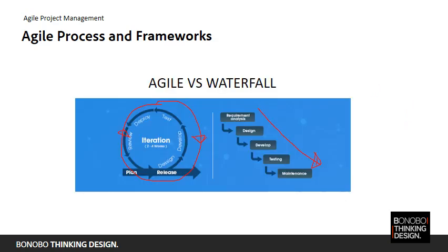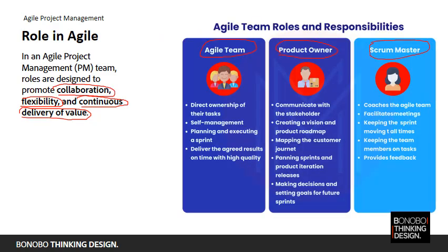And lean is about maximizing the value by minimizing waste, and that's again part of the continuous improvement. And then just-in-time production, again part of the lean process. Value stream mapping, again part of the lean process, where you look at the current state of a process and look at how much time each stage is taking, and what kind of interventions you can do to minimize the time or the cycle time there. So that's part of value stream mapping and other aspects of it.